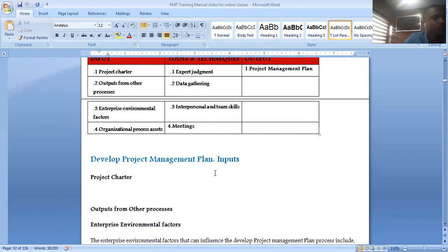But actually, since you are the one coming on board, you may want to plan according to its budget. Even if it's much, let it not be more than $2 million, in a way that it is not 50% more. You may want to keep it within 10% more or 10% less, plus or minus. So that is why you need the project charter. And then under it, you need all the players. If it is a construction project, you need your architect. And also you need your structural engineer. Who else?